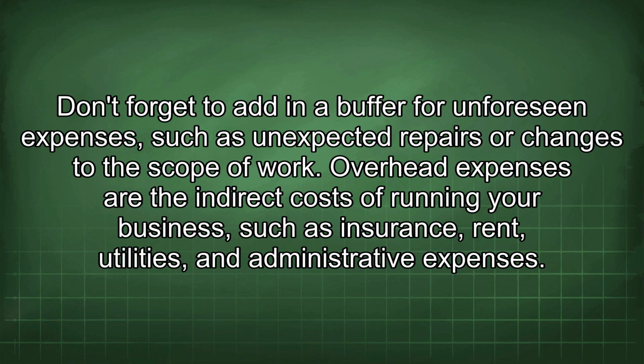Don't forget to add in a buffer for unforeseen expenses, such as unexpected repairs or changes to the scope of work. Overhead expenses are the indirect costs of running your business, such as insurance, rent, utilities, and administrative expenses.